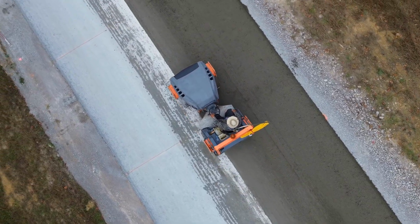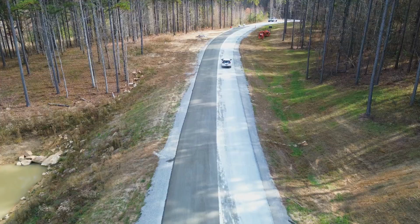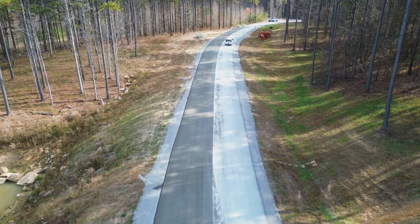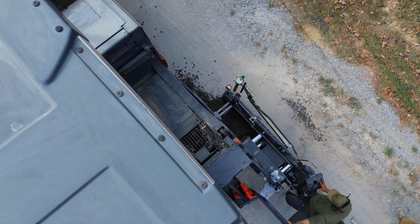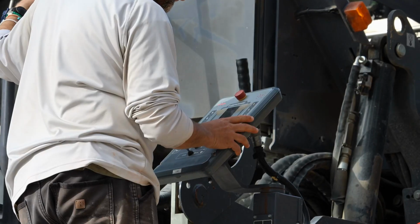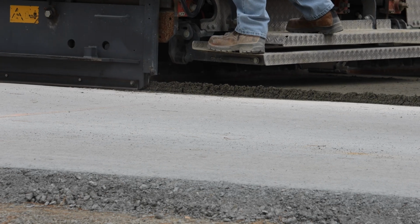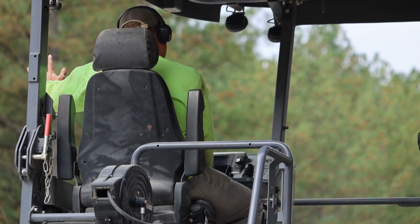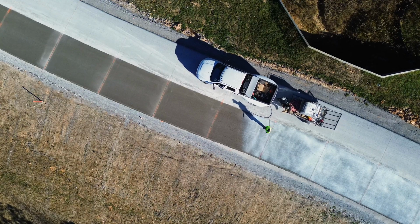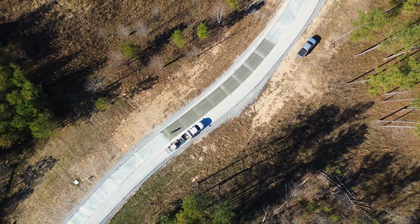After placement, RCC typically needs only 3 to 4 days to reach enough strength to carry construction traffic, although light vehicles can often drive on it almost immediately. Pavers use laser guidance to control lane width and elevation. Any high spots can be removed with diamond grinding. In some cases, RCC can be troweled to improve surface texture and provide an appearance similar to conventional concrete. A curing compound is sprayed onto the fresh pavement to control moisture loss and help ensure design strengths are met.